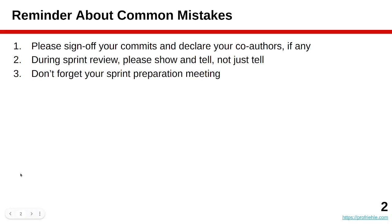Before I get to today's lecture, please be reminded one more time about properly signing off your commits on GitHub and declaring your co-authors if there are any with your pair programming. Please see the previous slides on how to do so. Also commonly done wrong during review: you should show and tell, not just tell. The release manager should make sure there's a good build and that you can demo your work off that build. Finally, don't forget your sprint preparation meeting — the product owners should sit down before the team meeting, make sure the product backlog is well groomed, ensuring backlog entries make sense from an engineering perspective, are not too vague, and not too large.